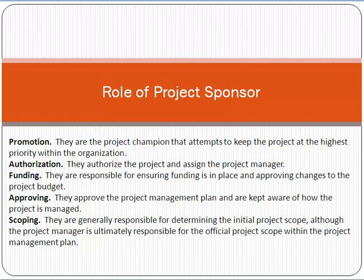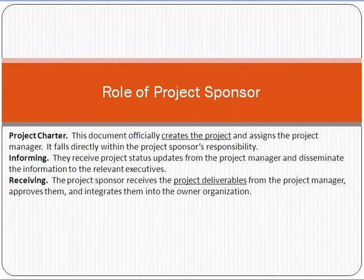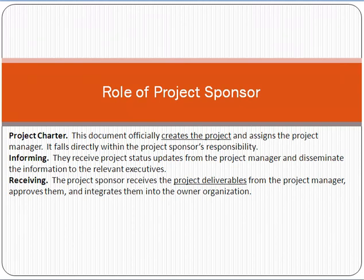Scoping — whatever scope of work is finalized in a project is reviewed and approved by the project sponsor, who holds the highest level of authority. All scope, funding changes, and technical reviews ultimately reach the project sponsor's desk for final approval or rejection. The project sponsor also approves the project charter — the document that officially creates a project and nominates the project manager. Finally, the sponsor receives project status updates and deliverables from the project manager.